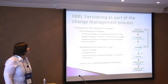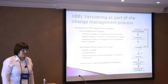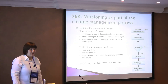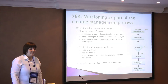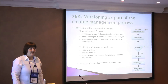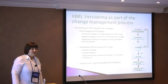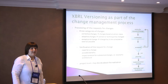Looking at how these processes can be structured: we start with the entry of the change request. We can separate three different categories of changes: corrective changes, mostly based on errors and typos; adaptive changes, based on contextual changes and adaptations to new XBRL specifications such as formula; and exceptional changes — changes with high priority that have to be done in a short time.